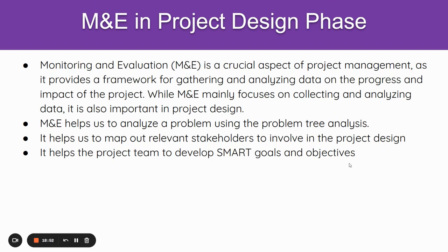If you want to start an educational related project, for example, to reduce the high rate of illiteracy in the country, let's say high rate of computer illiteracy in Liberia, the first thing is you need to understand the current literacy rate in the computer area. How well or how knowledgeable are people, especially the target group? Let's say you are targeting young people between the ages of 18 to 24. So you need to carry out a baseline study to inform you of the current status of young people between ages of 18 to 24 when it comes to digital or computer knowledge.